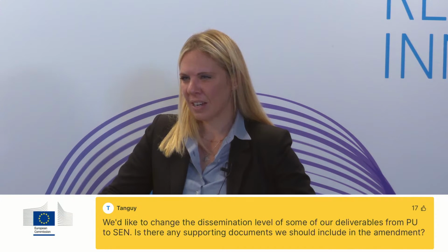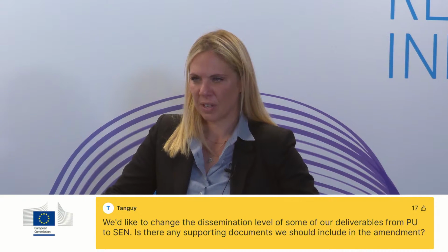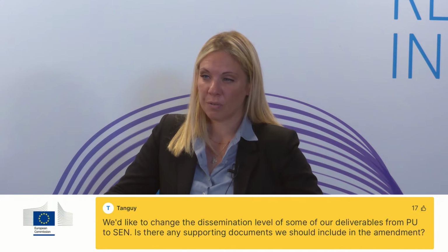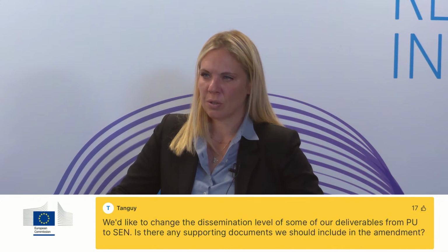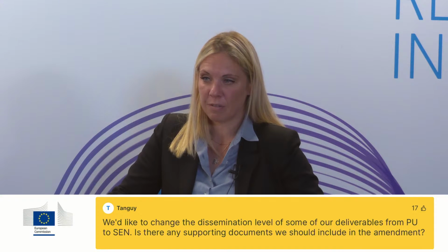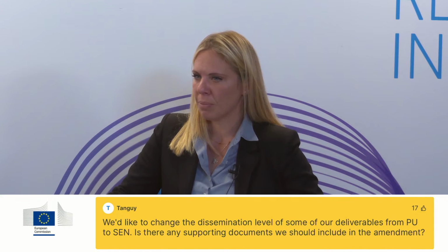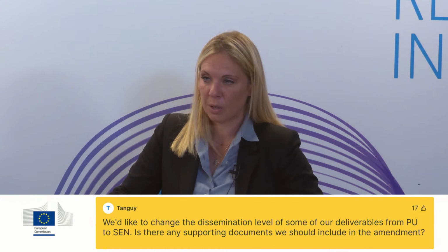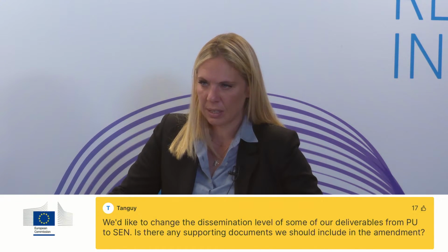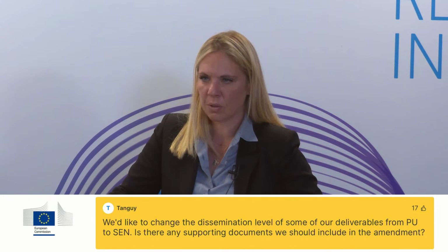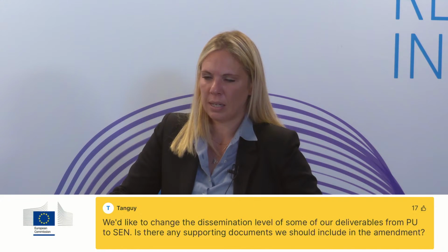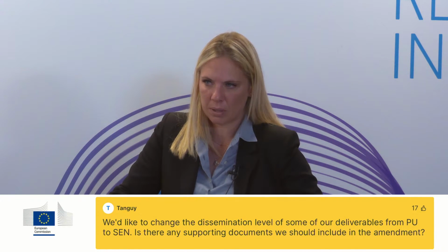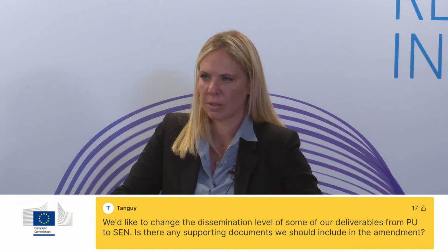Yes, in case of changes to deliverables, this means that you are changing the description of the action. So a change in the deliverable list, but no, supporting documents are not necessary in this sense because the information will be encoded directly in the system. So if the question is, do I have to upload any documents with evidence of this? No, technically this is not necessary.